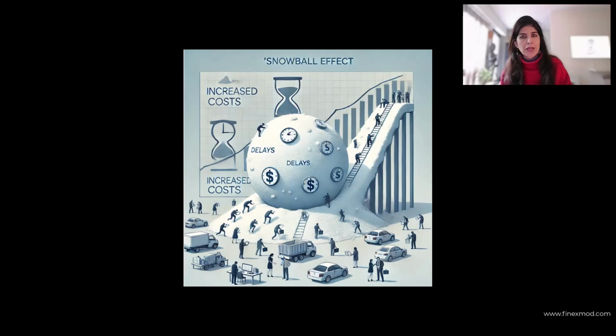So when you go to actual construction, at some point you see that you have a cost overrun that is accumulating, and you don't know why. You go back to your model and you see there was a glitch in the model. You didn't have the right sizing of your facility. This is a simple model, so you can review it and capture the error.